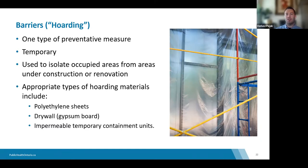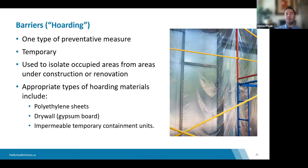Impermeable temporary containment units may also be used. If you're renovating an isolated room with a door, you may be able to use the door and some additional measures such as an anteroom as per CSA guidance documents, rather than erecting separate hoarding. Existing walls and separation may be sufficient to ensure work is carried out safely.